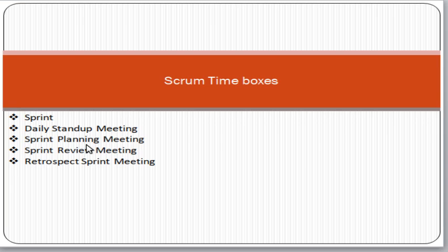and how you will plan, how you will develop, how you will test, and then when you will deliver to the customer. So it is a planning meeting, but it is a planning meeting for a limited number of tasks. Remember, it is not the complete product backlog discussion. It is a planning meeting for only a chunk for which you are going to deliver the tasks to the customer. Okay, so here remember that this is a difference.